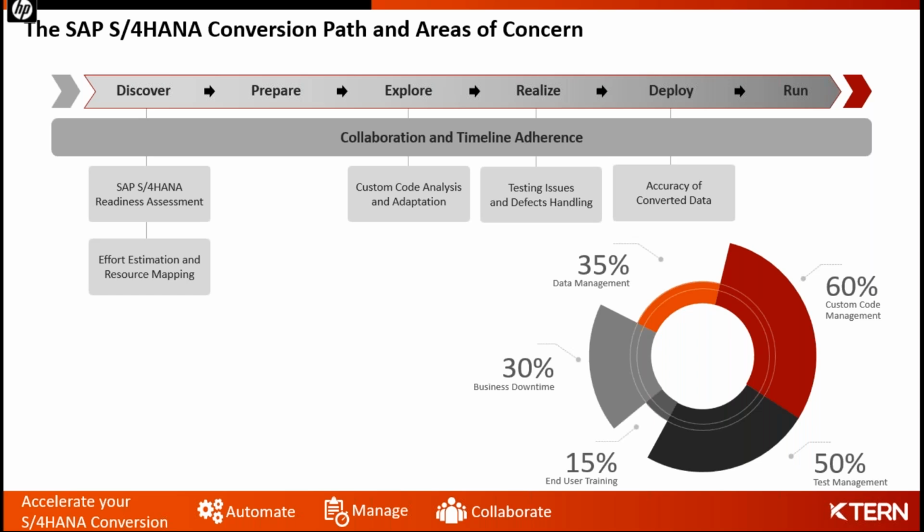And again, when you go to S4HANA, you have the choice to move on to the Fiori interface, and that will involve end user training and also identifying the right Fiori applications to be activated. And data management. With the amount of data that you've accumulated over many years, and also once you've migrated, the data validation that you would have to do, and the business downtime. This is one of the key factors, and the better you do the conversions and the more number of times you do the mock runs, it will make your business downtime much lesser, and that would ensure the success of the project.